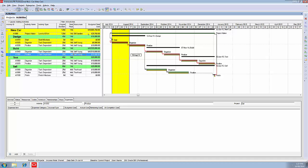We drag, watching that little calendar box, till we find the 18th of August. When we see that, we release the left-mouse button. The data date is now in the correct new position. It's highlighting for us those activities that need to be updated, or that we think will be updated in this particular period. People will now be reporting to us on the progress they've made on the activities in this period. We have two, basically. We've got the level of effort one, which should have had some work done on it, and we've got A1020, which should have had some work done on it. We don't anticipate any work being done on any of the later activities.